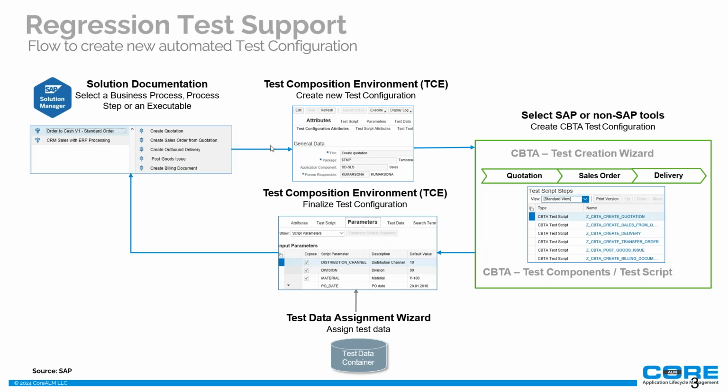And why do we bring in automation? Automation is very important during the regression test. With automation, we won't have to manually retest all the test cases every time. It will accelerate the time of the testing and will save us a lot of headaches on the testing cycle, which is usually the time and managing all the people and resources to run the test execution. But if you have automation, then it eliminates all of that. That's awesome.